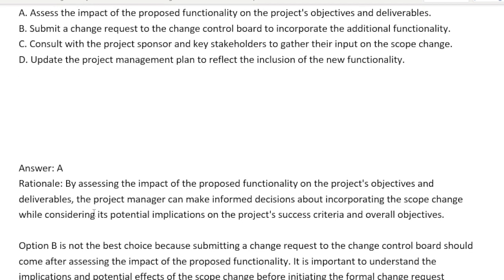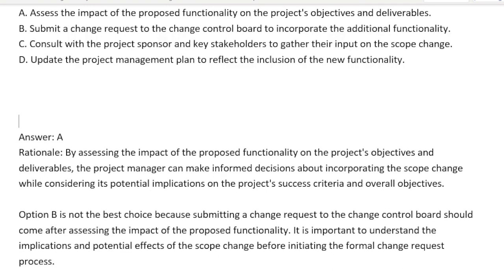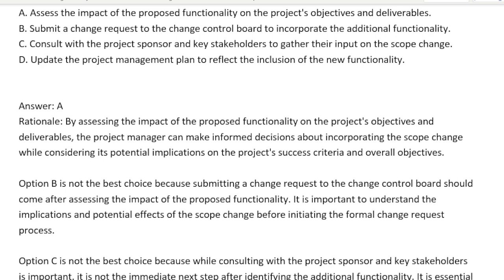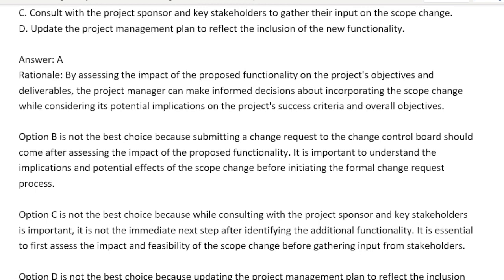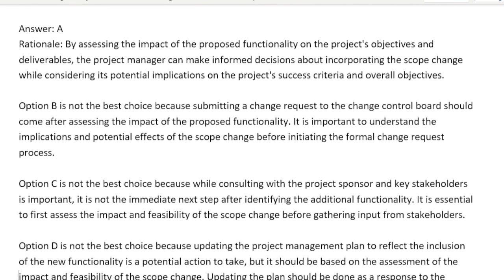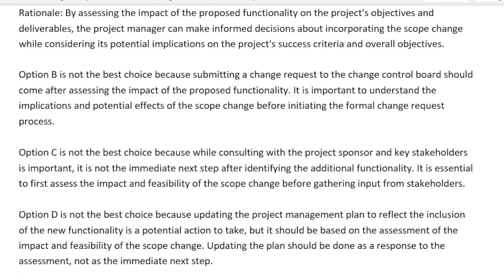Option B — submit the change to the change control board — is not the best choice because submitting a change request to the CCB should come after assessing the impact of the proposed functionality. It is important to understand the implications and potential effects of the scope change before initiating the formal change process. Option C — consult with the sponsor — is not best because while consulting with the project sponsors and key stakeholders is important, it is not the immediate next step. Option D is not the best choice because updating the project management plan should be based on the assessment of impact and feasibility, not done as the immediate next step.